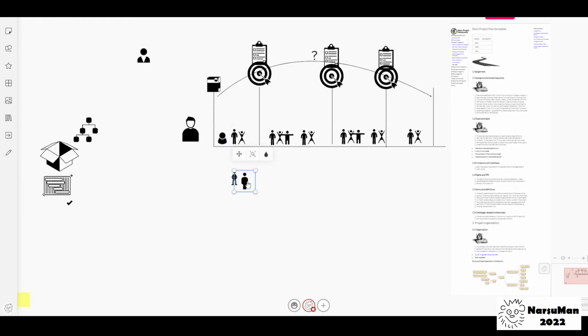There can also be people who are involved just for the end, checking and making sure that things are in the right order, or giving some consultancy or support. And that's why this list says who is needed and when, because this also gives some reality to the cost estimation, how many hours those people are used or needed for the project.